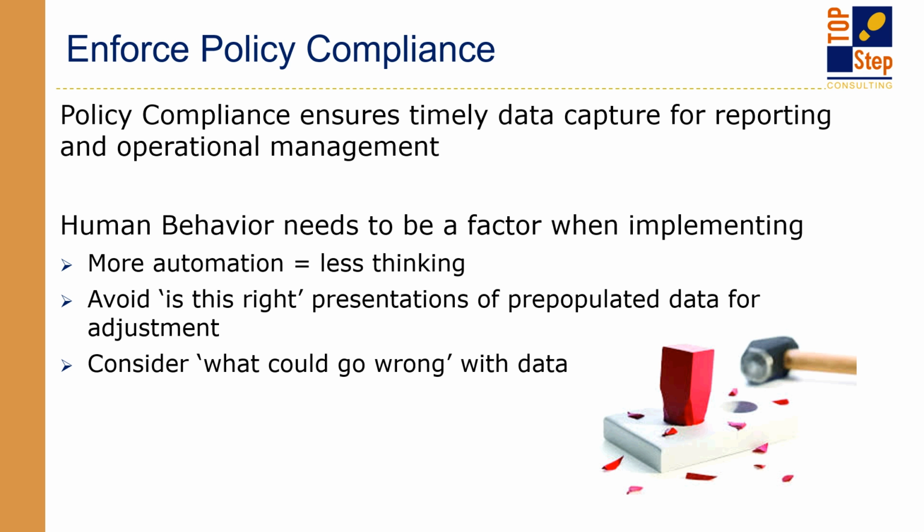If you say you're going to schedule this person, if you're using a 0 hours schedule policy, which is saying they're going to work 0 hours every day, and you're actually having that person work 10 hours a day on that project, your estimates versus actuals is never going to be right. So it's going to look like that person's overworked all the time. You're not going to know what's on the schedule, so you need to make sure that that's correct.